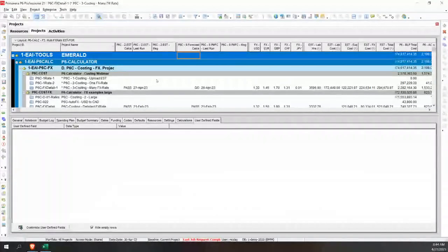So again, depending on what you're doing, if you're in a turnaround, shutdown, outage, that kind of project, you want to be updating once a day at least, and maybe twice a day at the end of each shift. That would be ideal. Now you won't necessarily get all the timesheets in every day. That might take a day or two, so that becomes a challenge. And you might not get all the updates on materials every day. So that could be a bit more of a challenge.